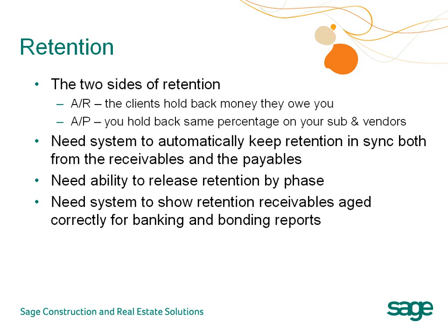But there are two sides to the retention issue, both accounts receivable and accounts payable. If the client holds back money from you, you need to have the ability to hold back money from your subs and your vendors. And each job may be different. So if you can use a system that automatically monitors and withholds retention by job or by vendor, you can save the headache of manually calculating, tracking, and releasing retentions, and prevent overpaying your subs before you've been paid by the client.